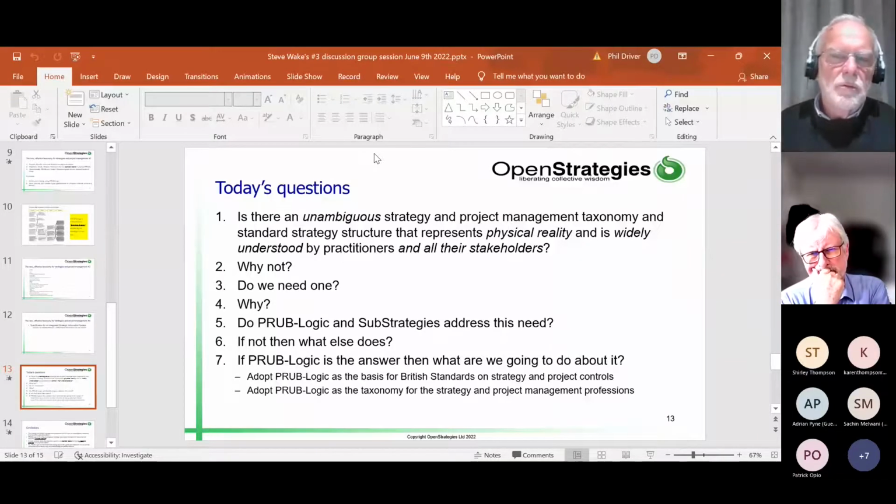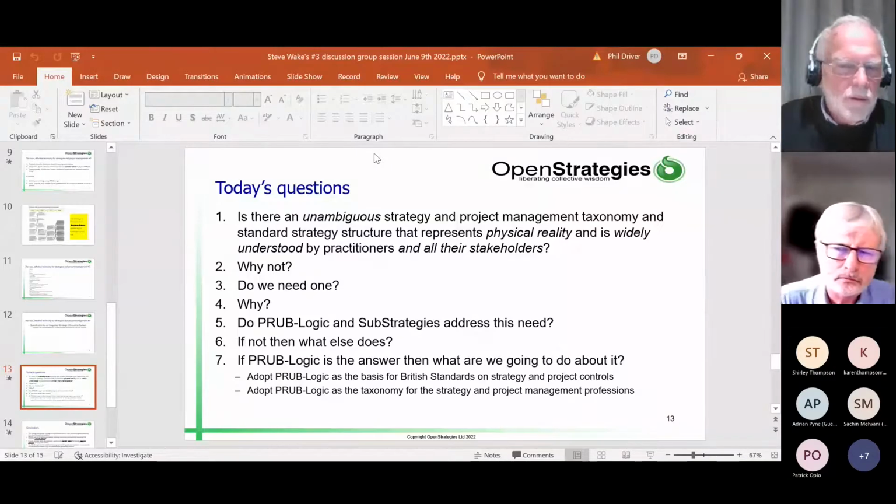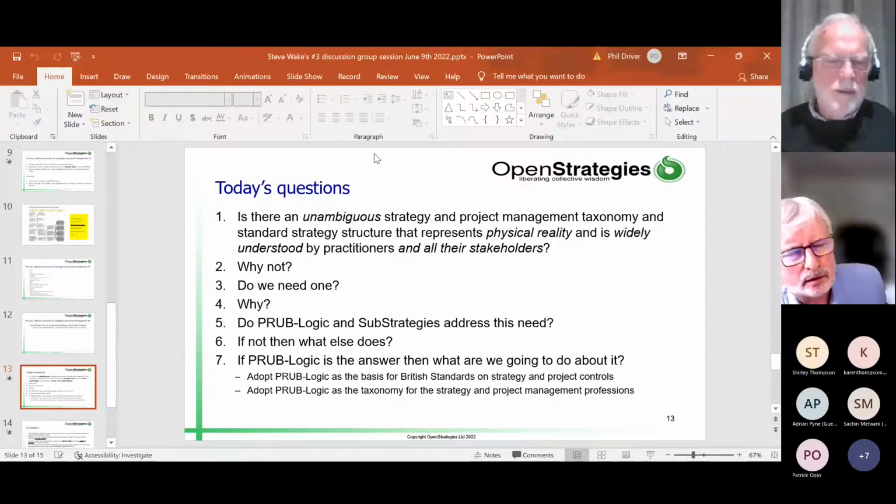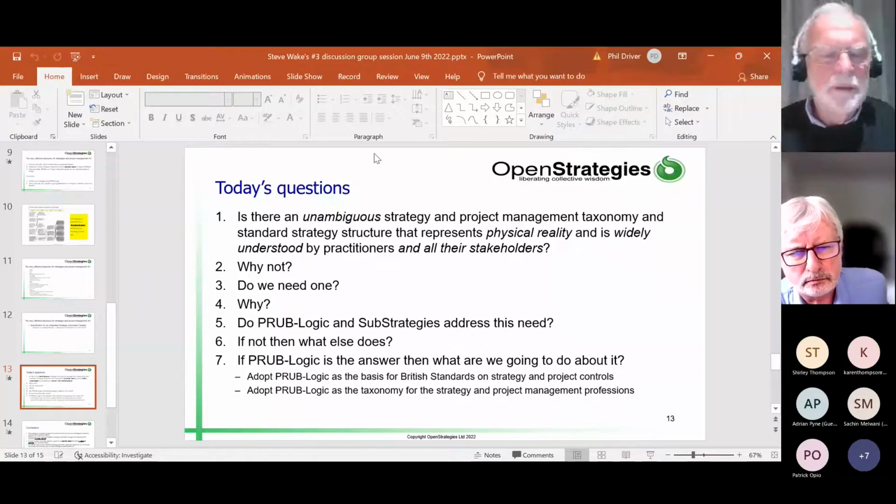You know, whether it's your customers or your ratepayers, what are they wanting to do in relation to climate change? And they'll say, well, we want to live safely. We don't want to be inundated. So there's the use, we're living safely. So we then look at the benefits of that and then we go back to projects and results. And I find that using those 4 words in a practical workshop, everybody gets it really, really fast. And we build up a sub-strategy very, very easily.